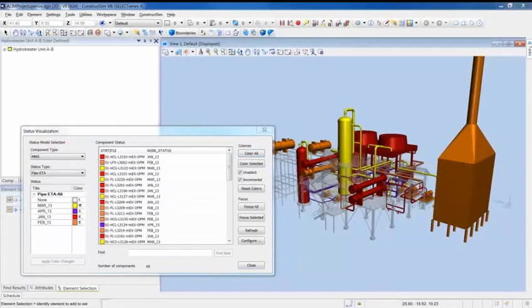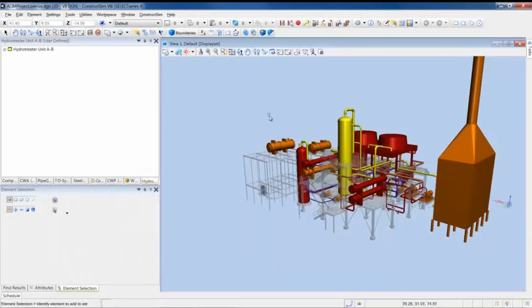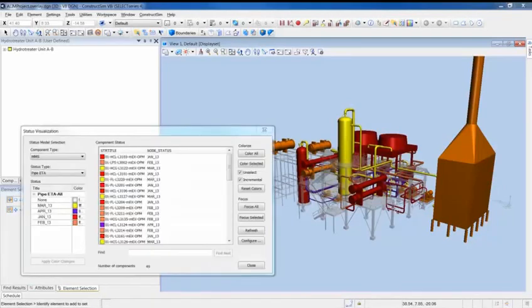In doing so, we may have highlighted an issue. In this example, we have 4 heat exchangers, 3 of which are scheduled to be delivered in January. The 4th, however, is not scheduled to arrive until February. And the question we need to ask is why.